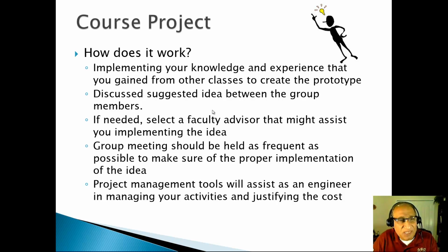That activity will take $2.50, and by doing this we calculated using one resource, 15 minutes of time, $2.50 to cut, and this is how we calculate the cost of that activity. So you need to think, how can I break down those activities based on the skills, assign those skills to these resources, to these activities, and what will be the cost of doing that.